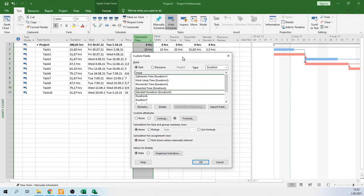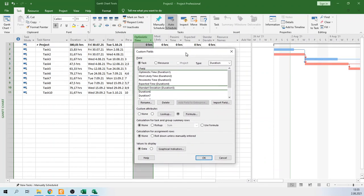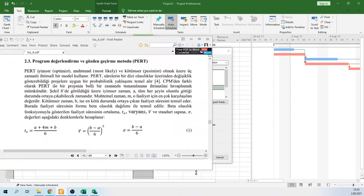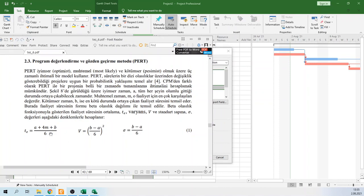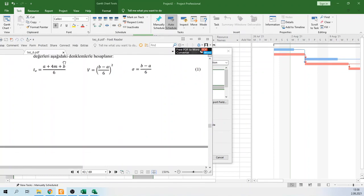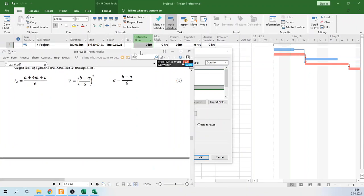The other thing we should do is define formulas for expected time and standard deviation. As you know, in PERT analysis we use beta distribution. We use this formula to calculate expected time and this formula to calculate standard deviation. Let's define these formulas.